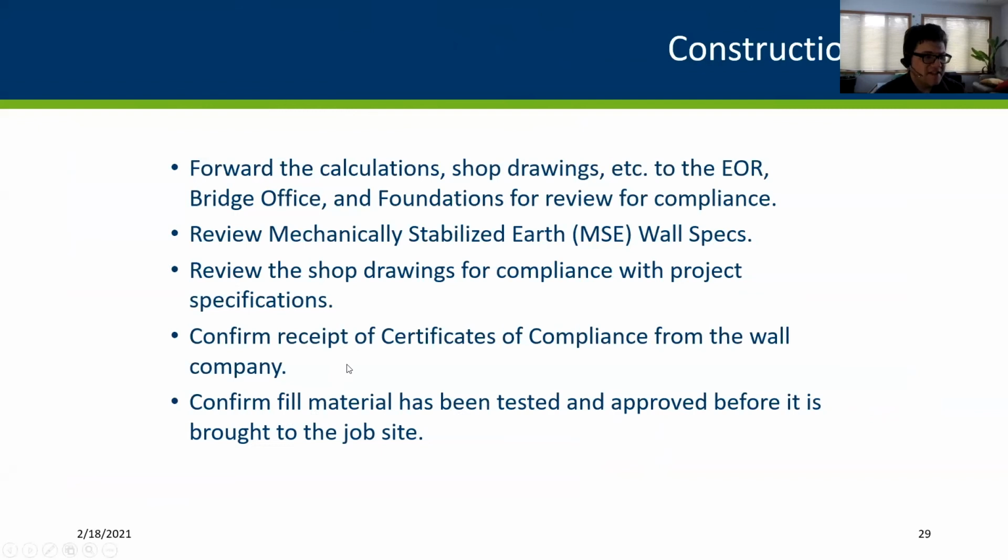But the calculations and the shop drawings are not usually checked by field staff. Those would be forwarded to the engineer of record. So if we didn't put together the plan in-house, if someone was hired to put together the wall plan, they should be involved in checking and making sure those drawings are what they expected to see and meet their specifications as well. I would also be involved.